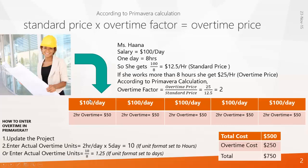And if she works for an activity of five days, she will be getting $100 per day, so that makes $500. And if she works two hours of overtime, she will be getting $50 because according to company rules, $25 needs to be paid per overtime hour. So working two hours gives $50 per day. Every day she's working an overtime of two hours, so that makes $250. So the overtime cost is $250 and the total cost of this activity becomes $750.